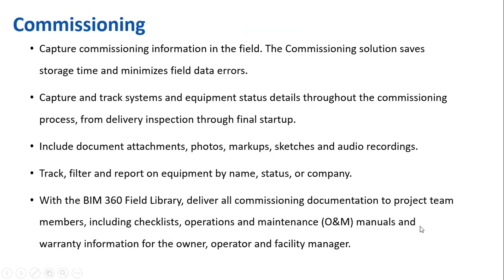Then the next one is commissioning. Capture commissioning information in the field. The commissioning solutions save storage time and minimize field data errors. Capture and track systems and equipment status details throughout the commissioning process from delivery inspection through final startup. Include document attachments, photos, markups, sketches, and audio recordings. Track, filter, and report on equipment by name, status, or company.